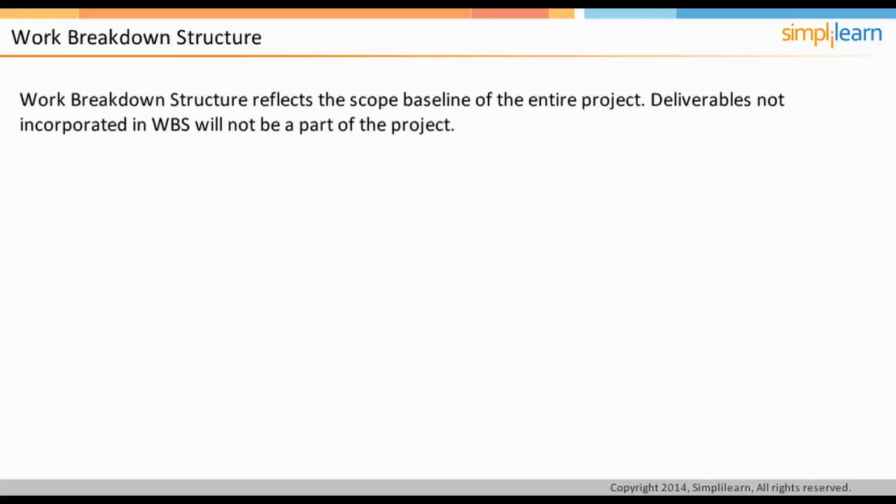Along with the scope statement and the WBS dictionary, the work breakdown structure forms the scope baseline of the project. That is, it should reflect the entire scope of the project. Any deliverables that are not reflected in WBS are not part of the project. The creation of the WBS should involve the whole team. The creation of WBS creates common understanding about the scope and therefore leads to team buy-in.